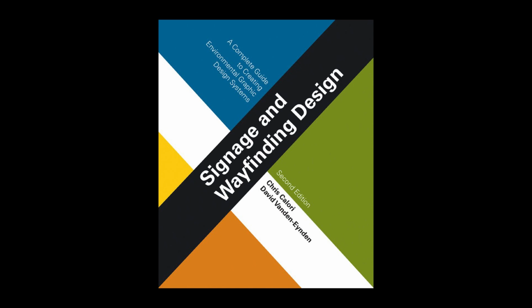At their most basic, unit price bid forms are itemized by the unit price for each sign type times the quantity of each sign type, yielding a total price for each sign type and a grand total bottom line price. Of course, there are many variations.